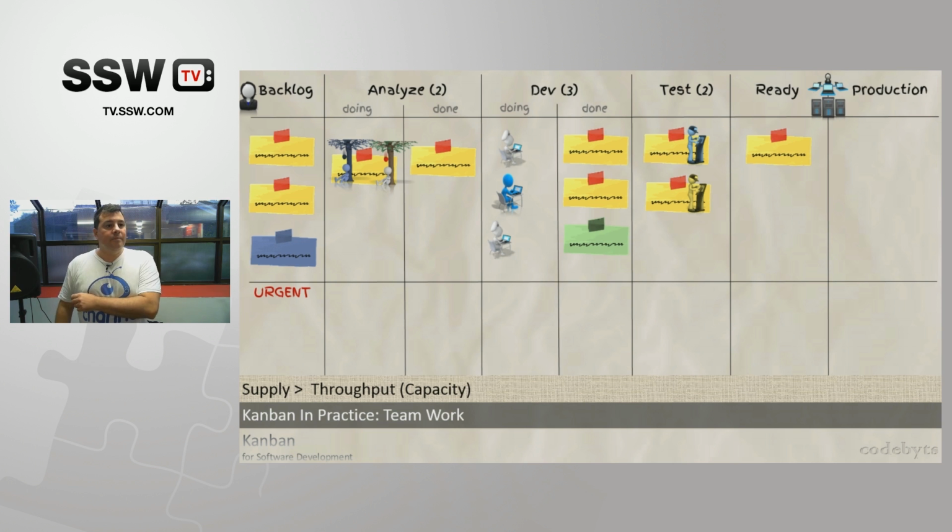Temporarily. So that can happen. Or maybe you don't want to stop the developer column. You want the production or the development to continue. You say, hey, 2 developers go and help with the testing of the 2 items, because it will still speed up the process, and you will use one of your developers to take what's being done in analyze. So still the development continues, nothing stops. There will always be a solution. If you can't find the solution, shoot me an email. We'll help you.